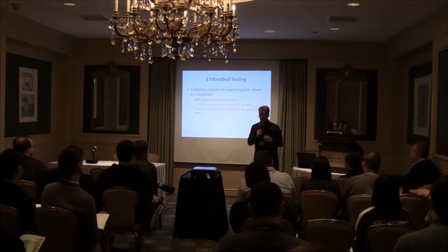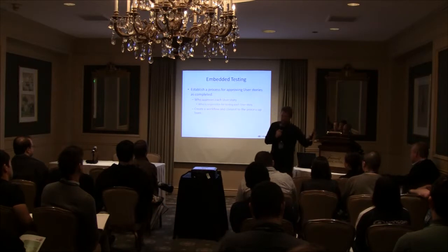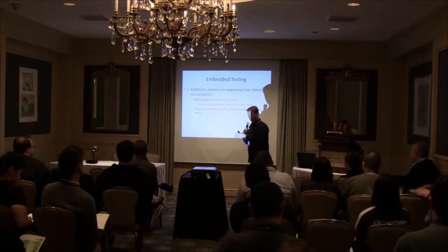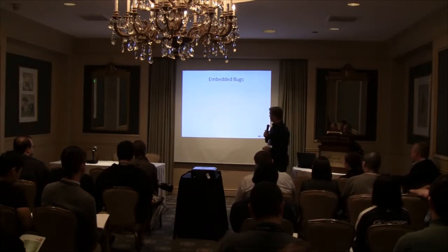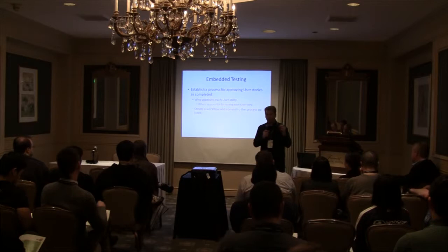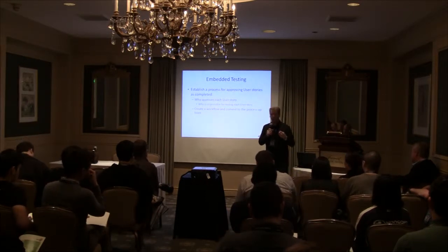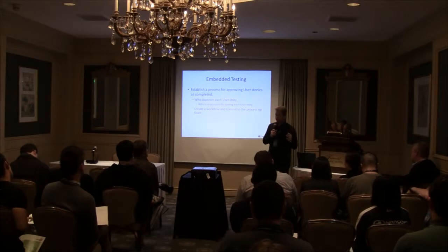That's the ideal solution. What that's going to stop is, I completed a feature, QA tests it, it either doesn't pass an acceptance test, or it has a bug and it goes in daily build and we've broken the build, or we've got something glitchy that's going to cause problems. By setting up these workflows and these processes, we're going to stop a lot of the general bugs, I call them the nuisance bugs, that are going to happen. Because as developers and artists start to check in content, they're going to know that before it goes anywhere, QA is going to take a look at it.